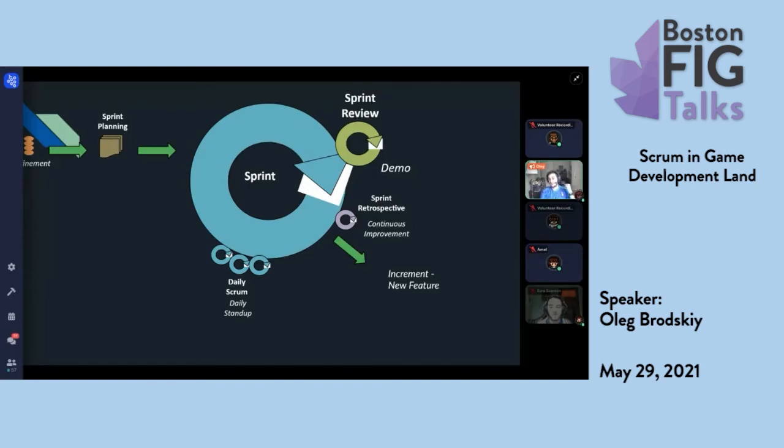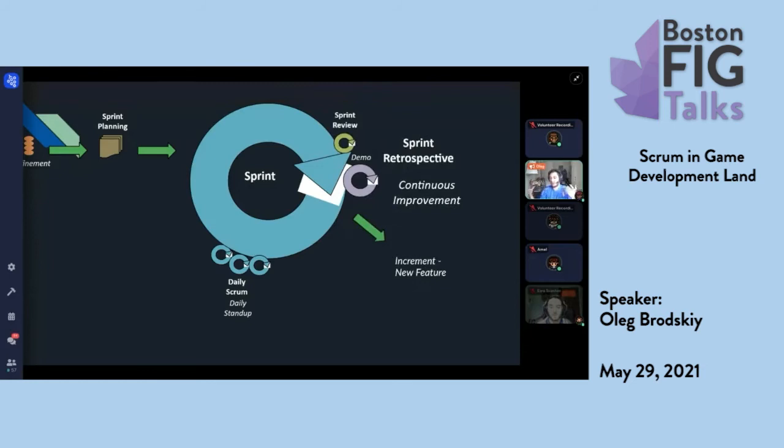And that leads us to the next thing, which is the sprint retro. So Agile is a process around iteration and improvement, not just within our product, but also within our team. The sprint retrospective is our opportunity for the team to meet as a group and talk about how things went in the previous sprint and figure out how we can improve our process so that it works better for us. So if the product owner has just rejected a sprint, that's a pretty good sign to the team: hey, something's not working. We need to figure out what's not working and try different approaches.